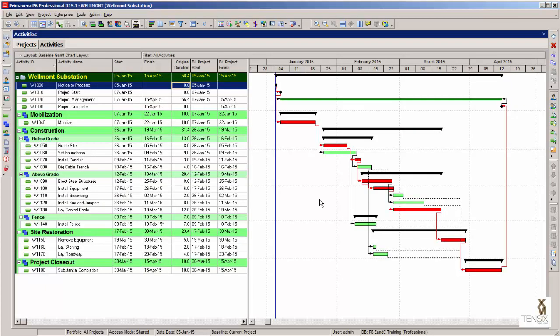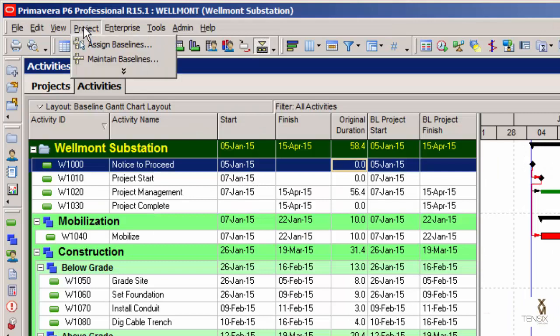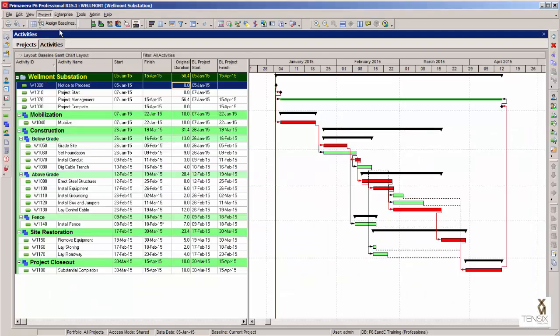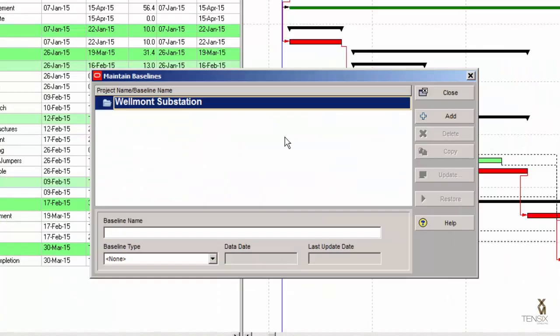Here's a sample schedule, and we're going to use this to demonstrate how to maintain baselines in Primavera P6. I'm going to go to the Project menu and go to the Maintain Baselines menu option. In the resulting dialog, we can see an Add button. I'm going to click that, which will add a baseline to the project.